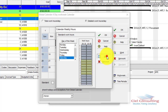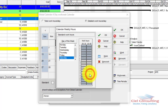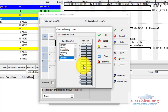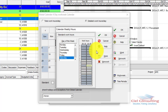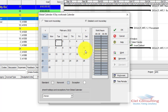Click Work, and the gray disappears between 9 a.m. and 6 p.m., showing these are working times for Saturday. Next, add a one-hour lunch break between 12 and 1 p.m.: click the two halves of 12 (12:00–12:30 and 12:30–1:00 p.m.) and click Non-Work. Saturday now shows work from 9 a.m. to 6 p.m. with a one-hour break. Click OK, and the Saturday grid disappears confirming it is a working day.